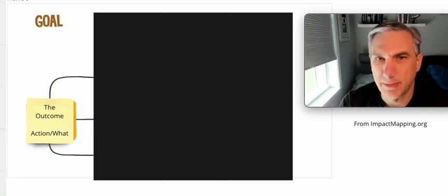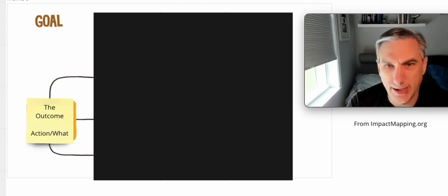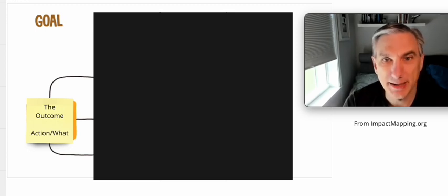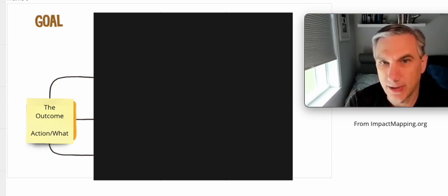Somebody was asking from the Better Backlog series how to do a backlog for a service. Normally we do product backlogs for a product or software, hardware, right? Now if you have a service, one of the techniques we talked about that will go a little bit more in depth is impact mapping. So I recommend you go to impactmapping.org. We're going to use their example, but this is a great way when you're doing a service to get started on a backlog.